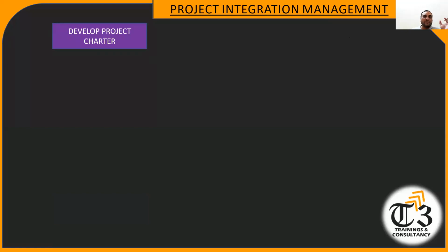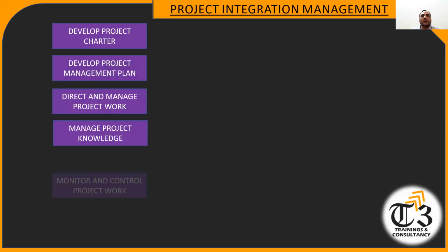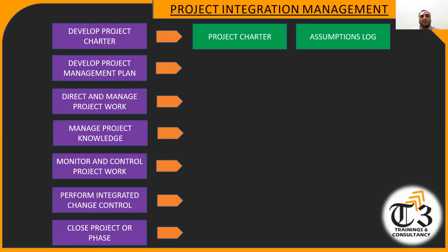As I said, it was the previous style, but it was good in terms of remembering the things. So to make the project charter, I need documents called feasibility study, business case, benefits management plan, and agreements. Agreements like fixed price, cost reimbursable, time and material, or agile contracts. So once we have all these things, we will hire the seller and we will start the process of the project charter. The sponsor will prepare the project charter and issue it in the name of the project manager.